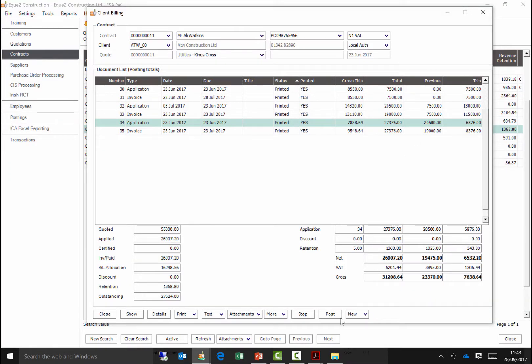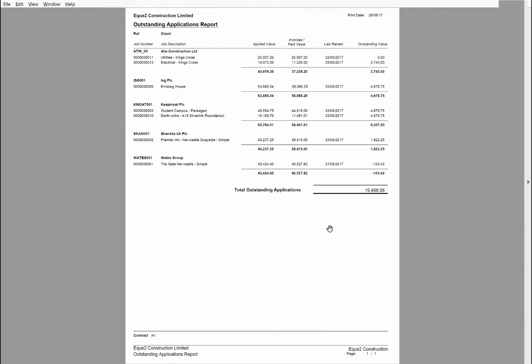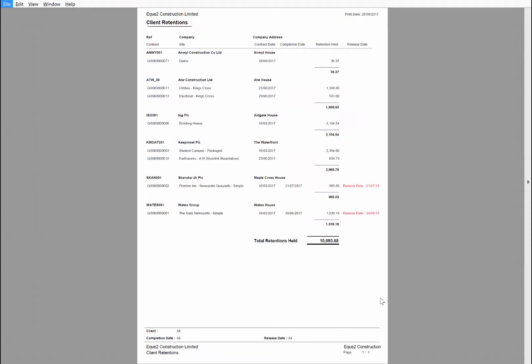Using the fantastic reporting tool, we can track applications that are still outstanding and under certified values. We can track retentions deducted by your clients by project - this will tell us total retention deducted, total retention deducted by the client and for each itemised project.